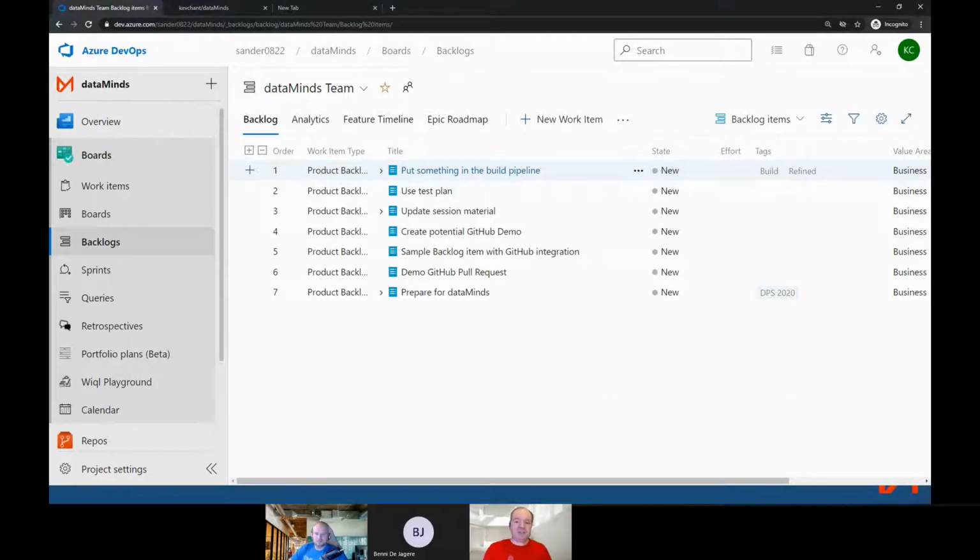By the way, everybody, the standard criteria for a backlog item to be classed as refined in Scrum is that the item is clear and small enough to be part of a sprint. However, bear in mind that businesses can have their own criteria for when an item is refined and ready for a sprint as well.